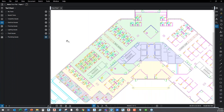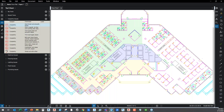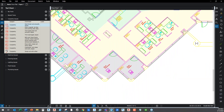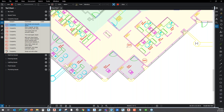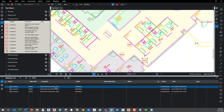Now I want to talk about using out-of-the-box punch list symbols. When Bluebeam ships, it comes with a number of predefined tools for different issues — simple punch keys that already have a comment associated with them. If I'm walking through the building and there's a problem with the wall finish, I just drop that comment. I can enable it to repeat, so if there's the same problem in multiple spots, I just keep placing it. In the Bluebeam markup list, it gives me all the comments — not just the symbol but the full label like 'wall finish not smooth repair' on each item.